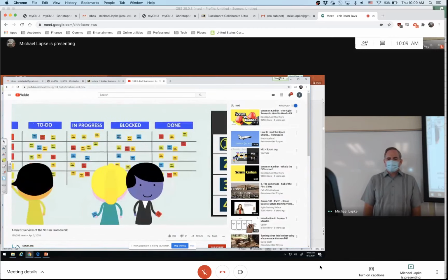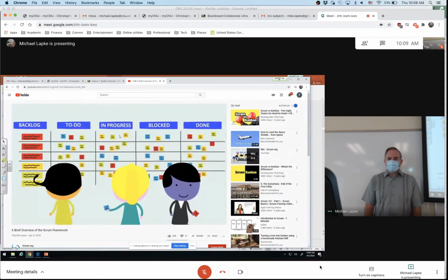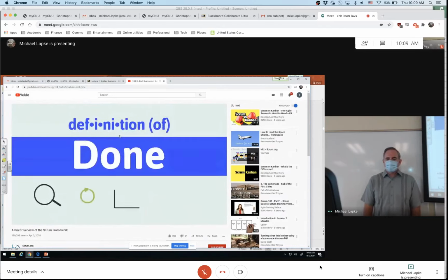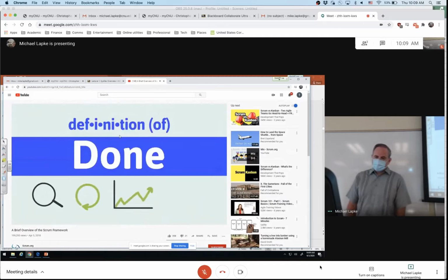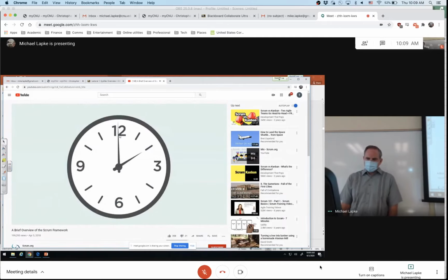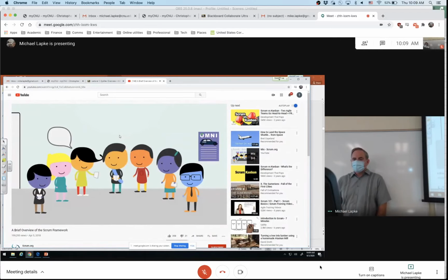During sprint planning, based on the sprint goal, the sprint backlog is created. With the definition of done in place, the development team works together to deliver value. Once a day, the development team meets for 15 minutes for the daily scrum to inspect and adapt their progress toward the sprint goal, and to surface dependencies or impediments.